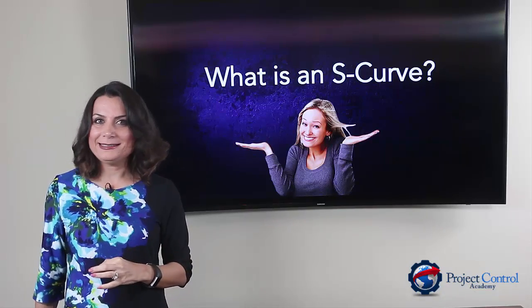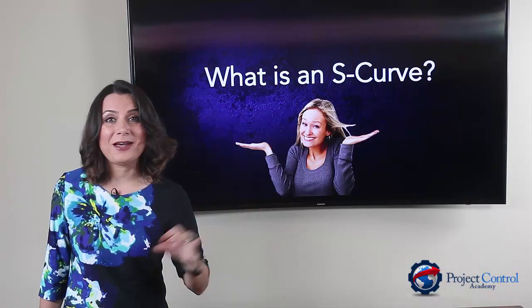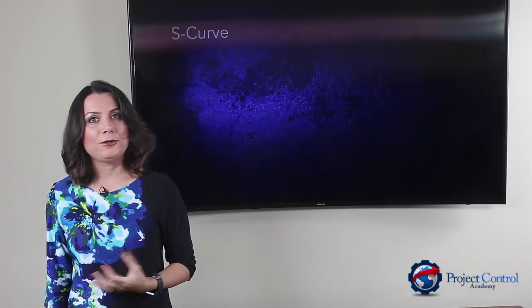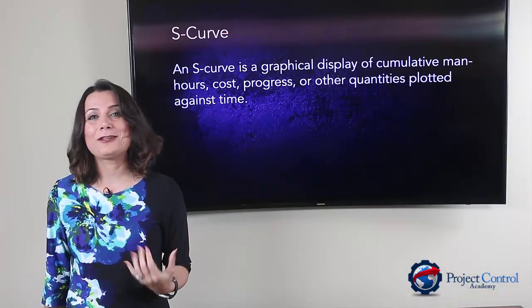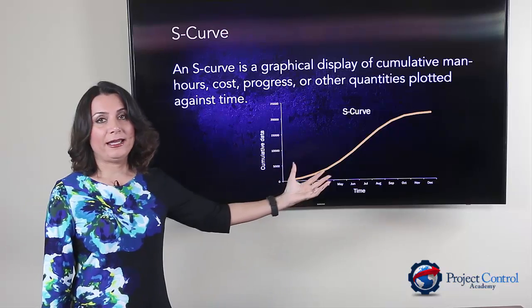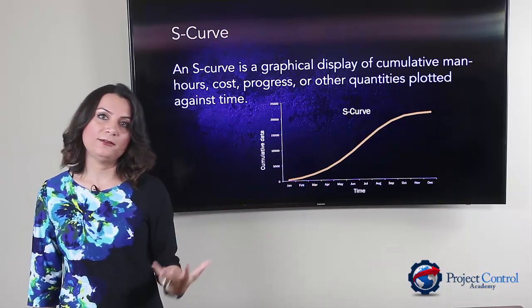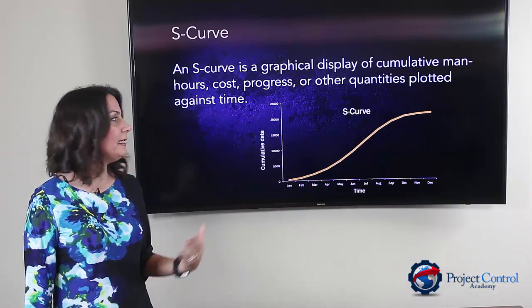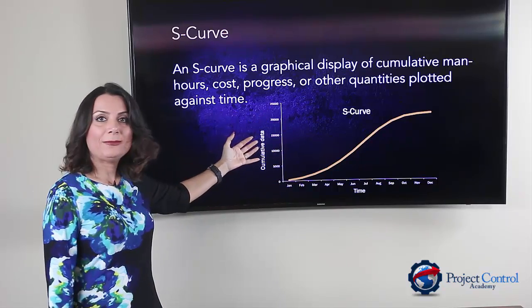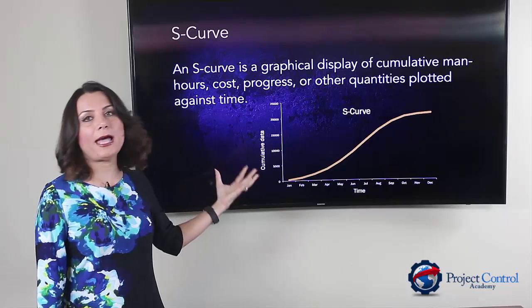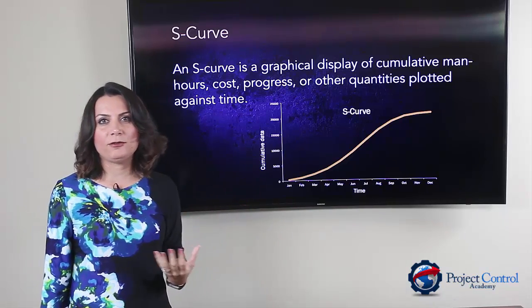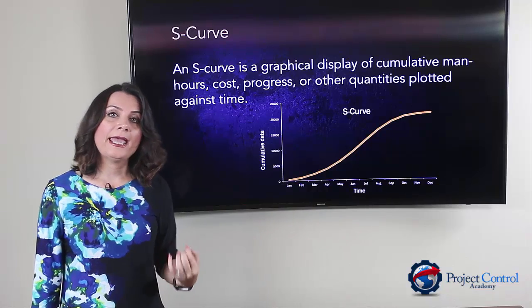What do you think of the S-curve without knowing anything about it? Let me define S-curve for you so you are more clear on what we are talking about here. S-curve is a graphical display of cumulative data that is plotted against time, and that cumulative data can be anything such as cost, manpower, quantity, or progress — different types of project information that you want to plot against time.